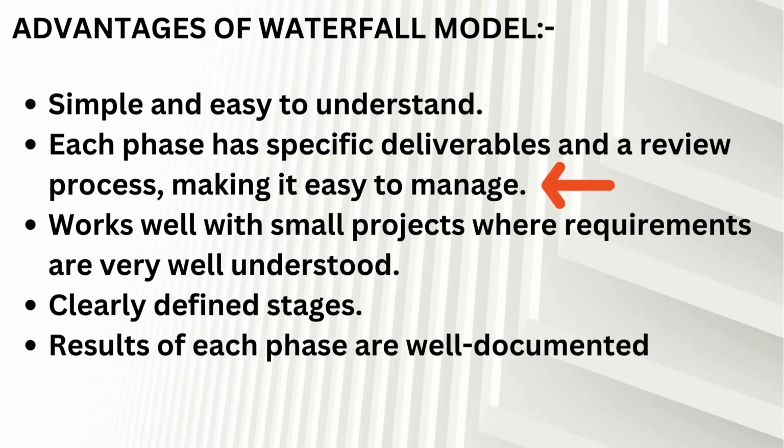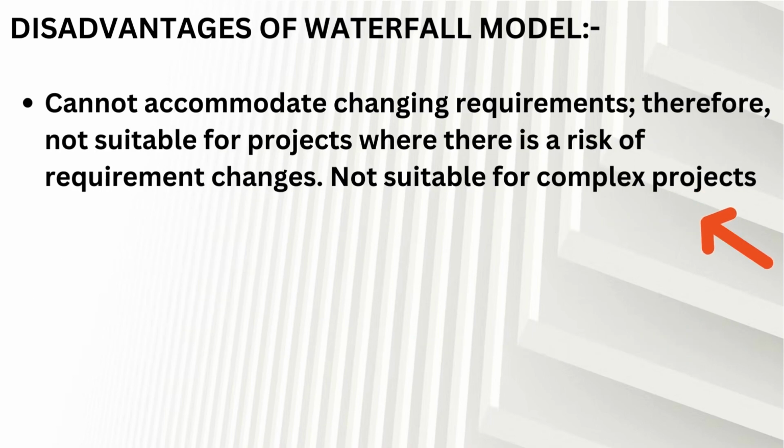The third advantage is that it is suitable for smaller projects. The fourth one is that, in the waterfall model, all stages are well defined. The last advantage is that all stages will be documented. Now, let's explore the disadvantages of the waterfall model. The first disadvantage is that if requirements keep on changing, then this model is not suitable. Why? Because the waterfall model follows a sequential approach. For example, once the requirement analysis is done and we move to the design phase, we cannot go back at any cost. So, once the requirement analysis stage is done, it will be frozen and won't be changed after that.